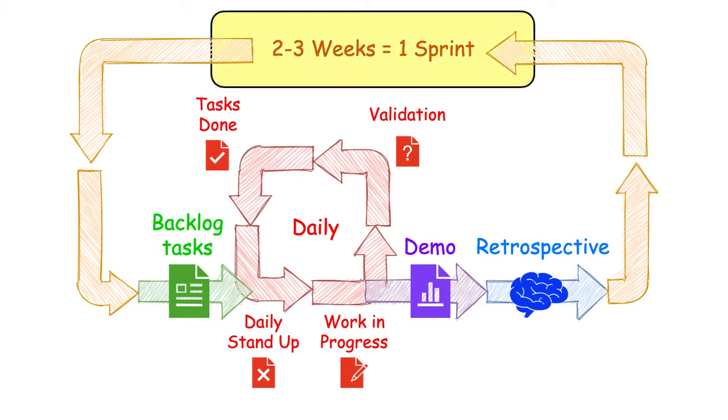So in Scrum, the semester is broken up into 4 to 5 work periods called sprints. Each sprint would be about 2 to 3 weeks, focus on a small number of topics, sometimes only one theme. And so this entire process will repeat itself 4 or 5 times.